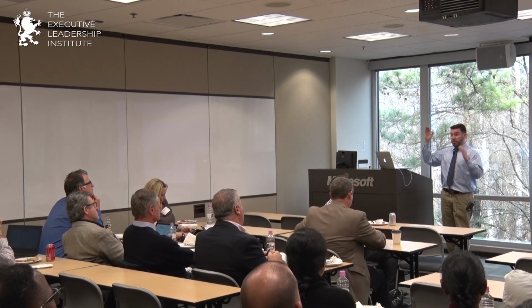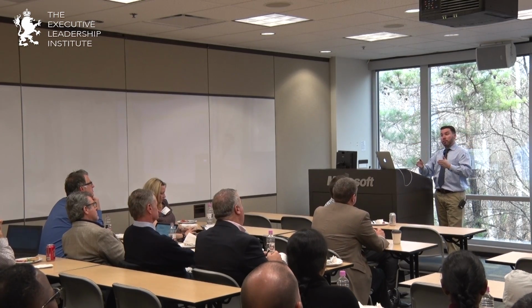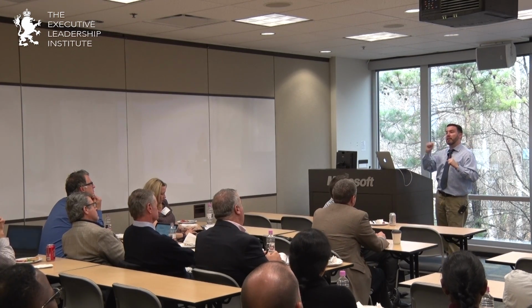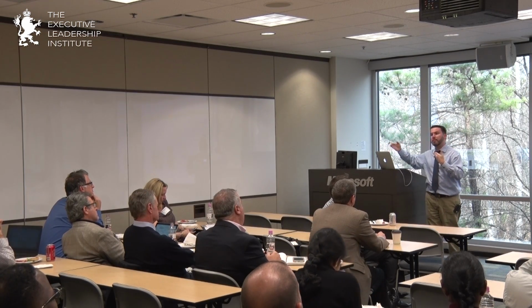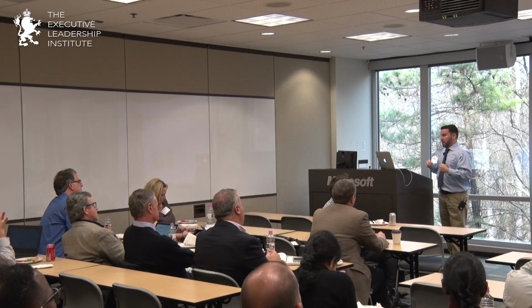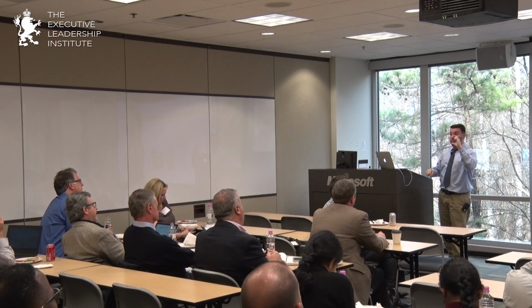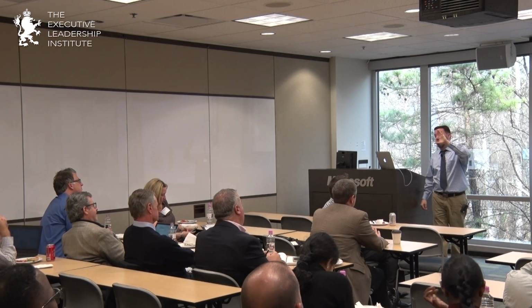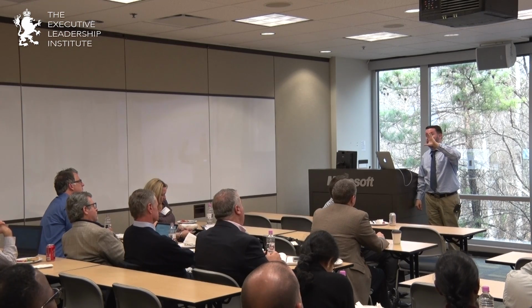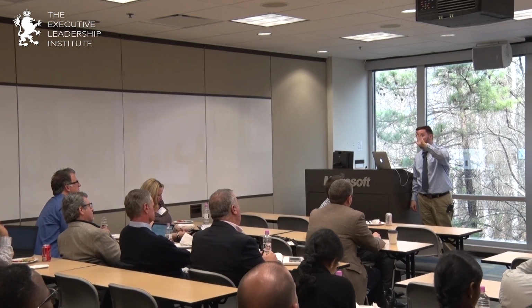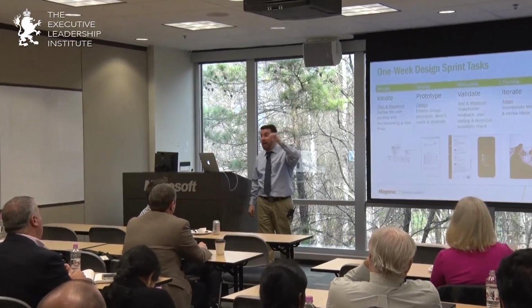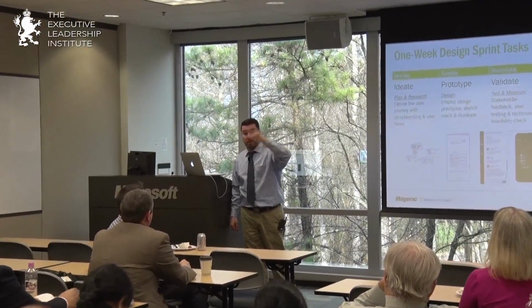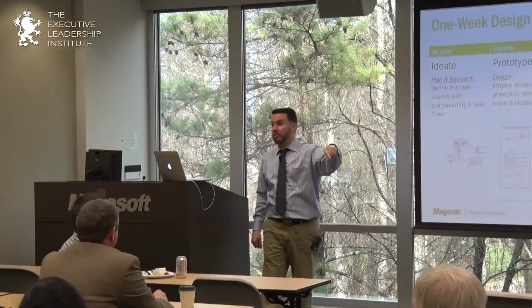The developer's already said it's going to take me this long to code them, but I'm saying, you know what? I'm going to go ahead and tackle all of these in a different amount of time. What it's going to take for me to design it might be different than to develop it, right? So if there's 5 user stories in Sprint 1, and the developer is going to work on 2 of them in week 1 and 3 of them in week 2, but I've already validated and prototyped them and got sign-off in 1 week, I can move on to Sprint 2 user stories that second week.